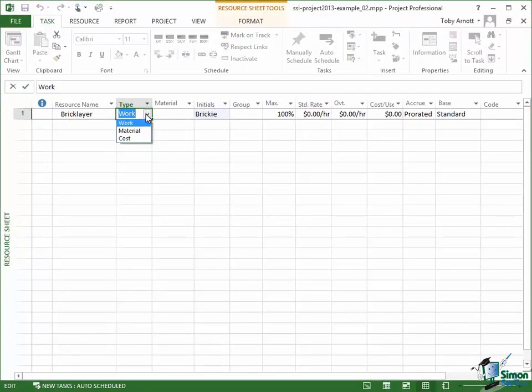There are some alternative approaches to costs and budgeting which sort of lead you to a fourth type of resource but it isn't really a different type of resource at all. We'll talk about that briefly later on. The three types of resource are work, material, and cost.